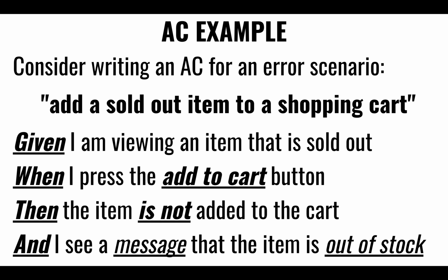Oftentimes we might have a parent story, and then that parent story might have other sub stories underneath, right? There might be a development story, there might be a design story, there might be a test story, right? And the QA engineer is responsible for the test story, and the developer is responsible perhaps for the design and the implementation story.